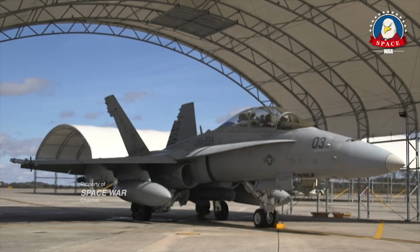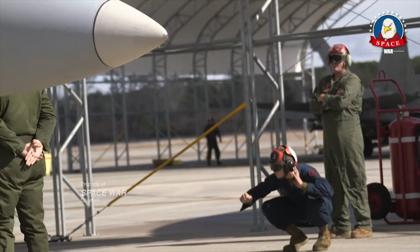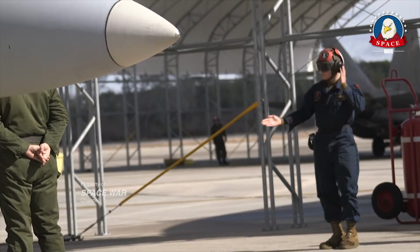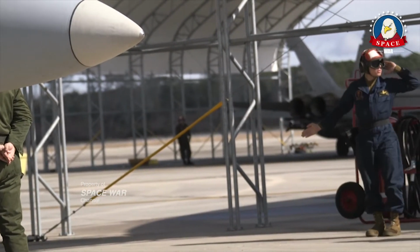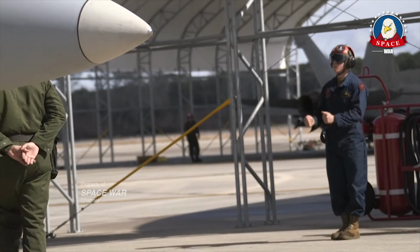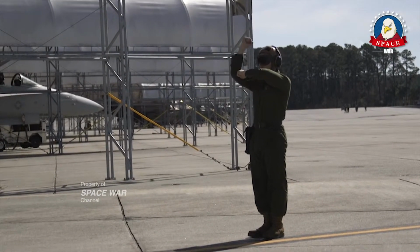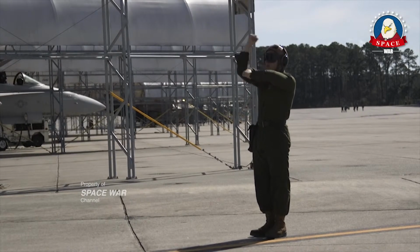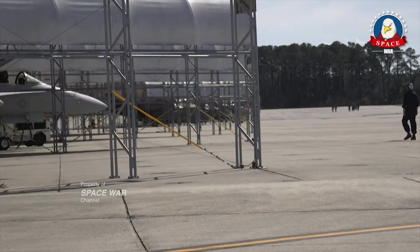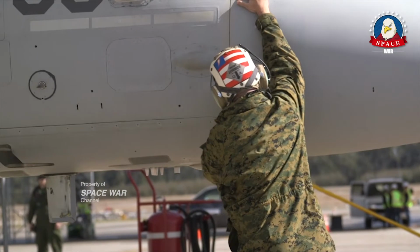Ground-side F-35s would come with flight simulators instead of two-seat trainers, and a logistics system for logging maintenance reports and procuring spare parts. Normally, it's prudent to integrate new technologies into proven baseline systems. However, the Pentagon approved concurrent development of the F-35's avionics, software and airframe, meaning that the baseline F-35 was constantly evolving. This resulted in cascading delays and cost overruns as the all-new technologies failed to integrate as easily as expected.